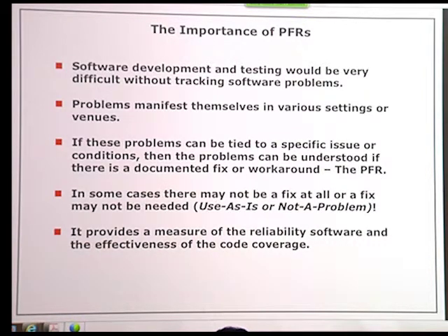And so you do find that a lot of the internal software problems that occur during development or during unit testing eventually get propagated into full-blown problem failure reports. Now, if these problems can be tied to a specific issue or conditions, then the problems can be understood, and then you can document the fix or workaround. That's essentially the core of the PFR.